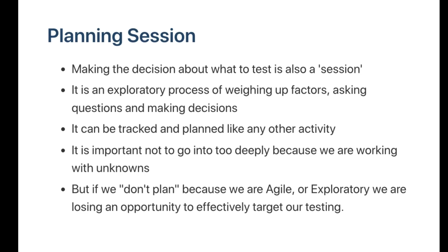Very often what happens is when we do testing, a lot of the work that we do doesn't make its way into the tracking system. It's not visible to people. They don't know what we're doing. So the only thing they see are huge gaps of time, then an hour where we did some testing, then defects magically appear and testers running about asking questions, right? It's really important that if you can, chunk your work as much as possible into sessions.